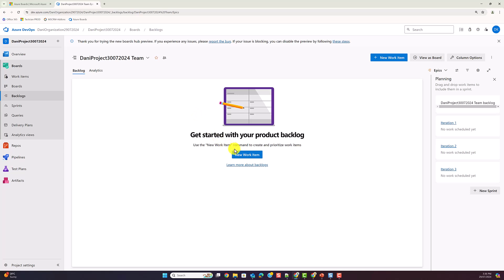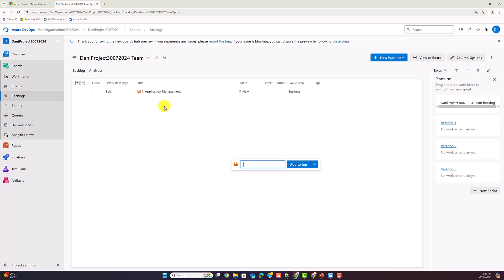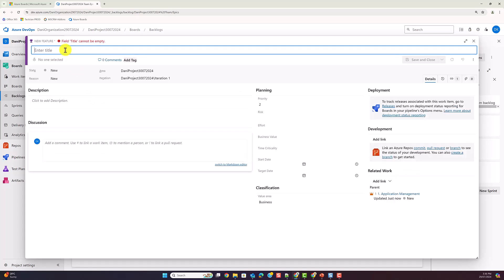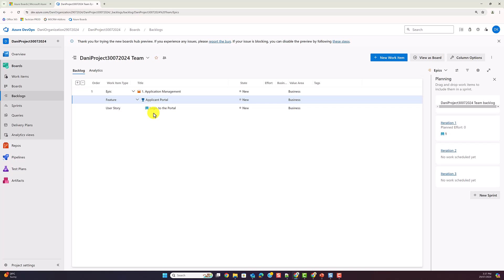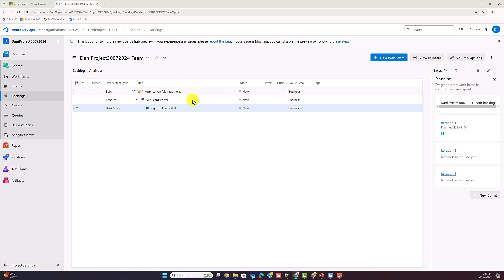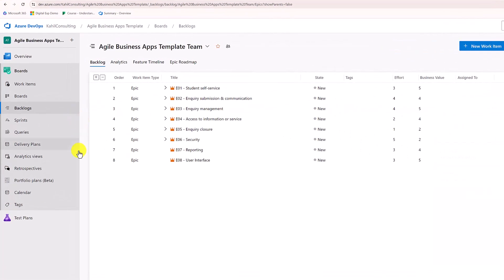Once I've done that, I can create epics, features, or user stories. Starting with epics — I create a new epic called 'Application Management,' for example. Then using the little plus button I can create a new feature called 'Applicant Portal.' From my feature I can then create a user story like 'Login to the portal.' I won't go into details on how to write user stories — this is really just about how to create your first work item types with epics, features, and user stories.